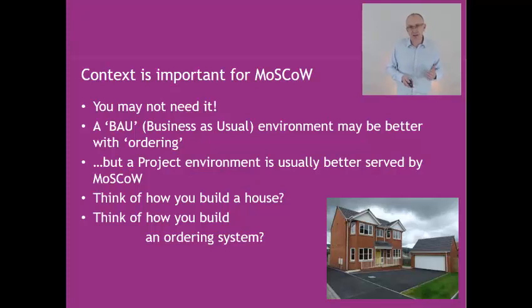Think about how you'd build an ordering system. If you had an ordering element, a payment element, and a stock control element, you work on the ordering element because this is where everything is, if you like, as a group. And there'll be musts, shoulds and coulds in that area. But it means that if that bit takes, say, a month, it means the ordering system or the ordering element will be finished after 1 month because you're going to trade out things like some coulds. So importantly, MoSCoW tries to keep you on time over the whole project, but also on time over key deliveries during that project.